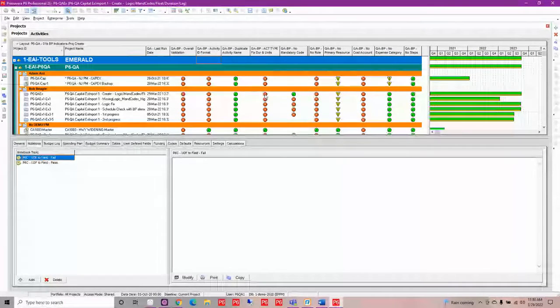Those are something that maybe we want to go take a look at. It might be okay that they are not fixed duration in units, but it'll flag those and show you where you might want to critique that, to make sure that is actually the activity type that you intend. Then you could set that blue star to say I've looked at it and it's okay, and then rerun and possibly get a better outcome on your indicators here.